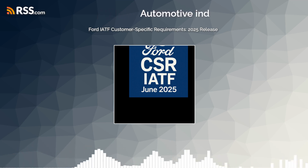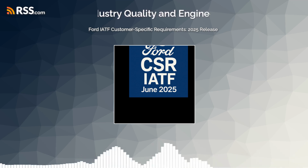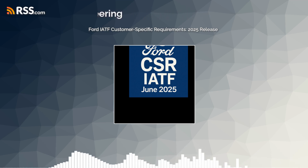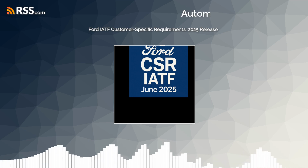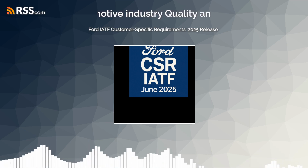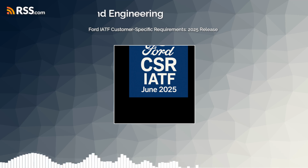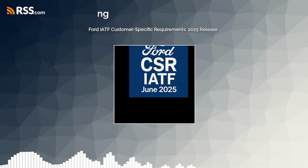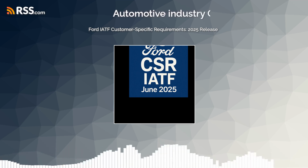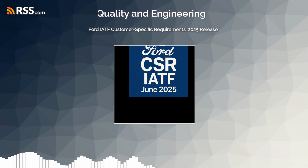And APQP, Advanced Product Quality Planning, comes up here. Specifically, the External Supplier APQP Readiness Assessment, Schedule A. That sounds formal. It is formal. This is how Ford formally monitors and confirms a supplier's progress through the APQP process and their readiness for the production part approval process, PPAP. Schedule A is required for specified programs and for any new tooled end items, TEIs, for a launch, essentially any brand new part requiring new tooling. Its purpose is to provide a structured assessment of the supplier's APQP readiness.